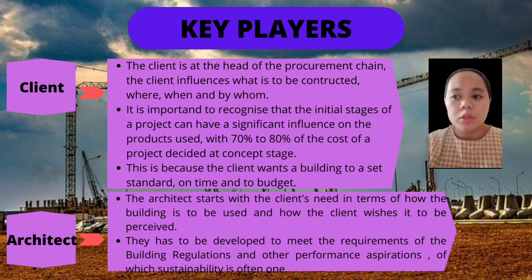It is important to recognize that the initial stage of a project can have significant influence on the product used, with 70% to 80% of the cost of a project decided at concept stage. This is because the client wants a building to set standard, on time and to budget.